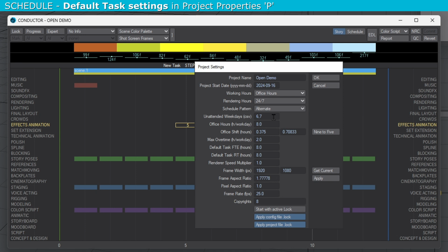Any manual update on the estimated FTE or render durations in the task properties of that task will improve the quality of your planning. The auto-schedule process returns the result of your set assumptions and limitations. If your activities do not fit into the schedule, you will need to make changes to the team, the render farm, the content of your final product, or perhaps even the render quality.